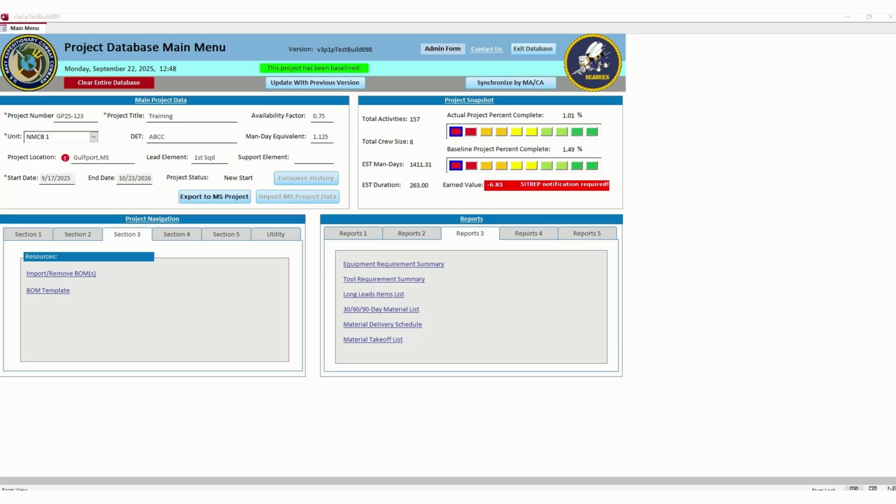Well, the reason you might have all blue is if you go here to projects, you'll see that it has all this, but you really want to go to Gantt chart format. Okay, under Gantt chart format, you see critical tasks, slack, late tasks. Well, we just want to see our critical tasks, right? So once you click on that, you should see your critical tasks now. All right, so your critical tasks are in, and now you see it this way.